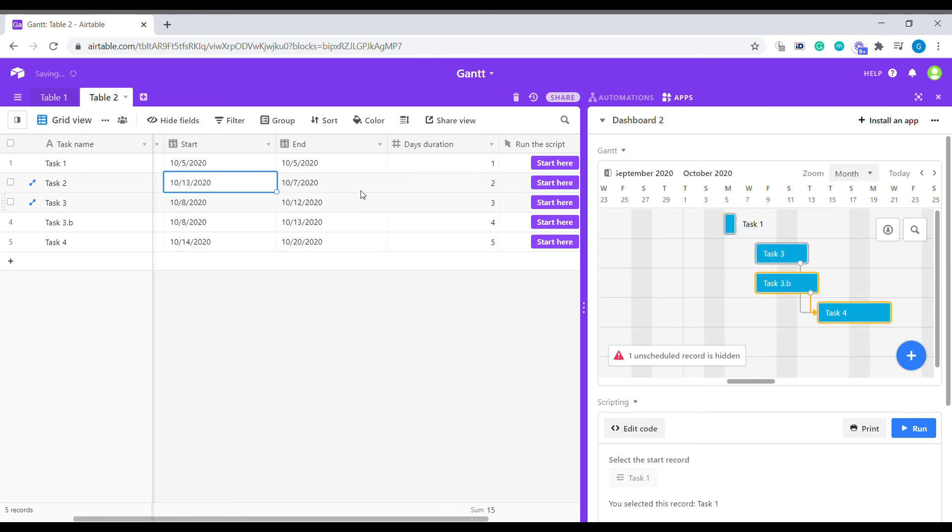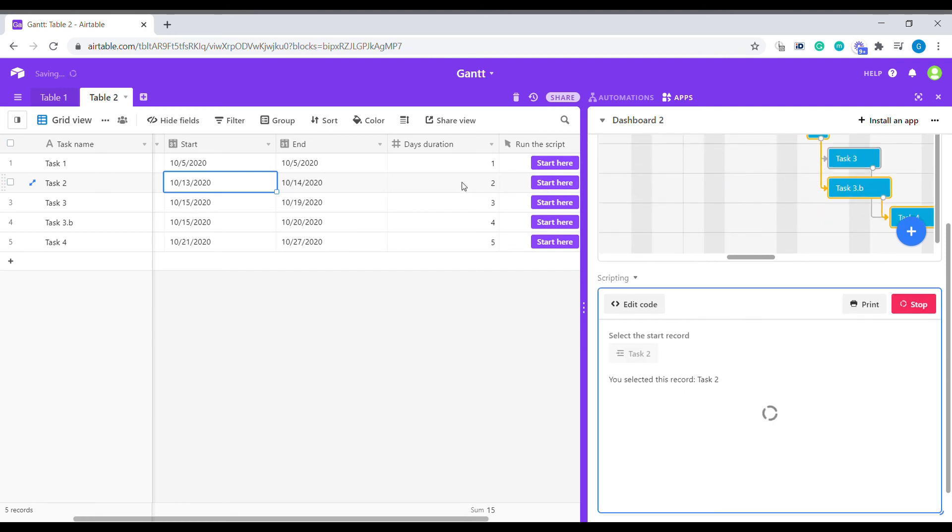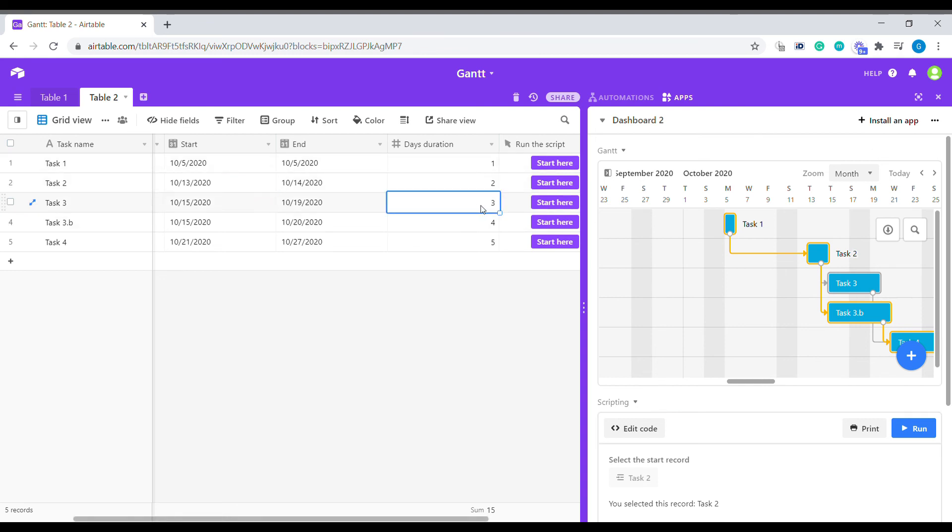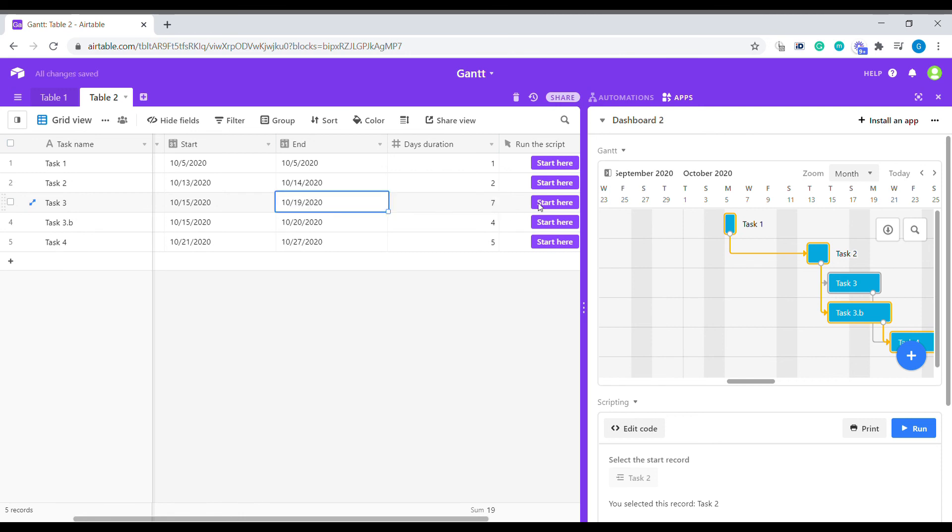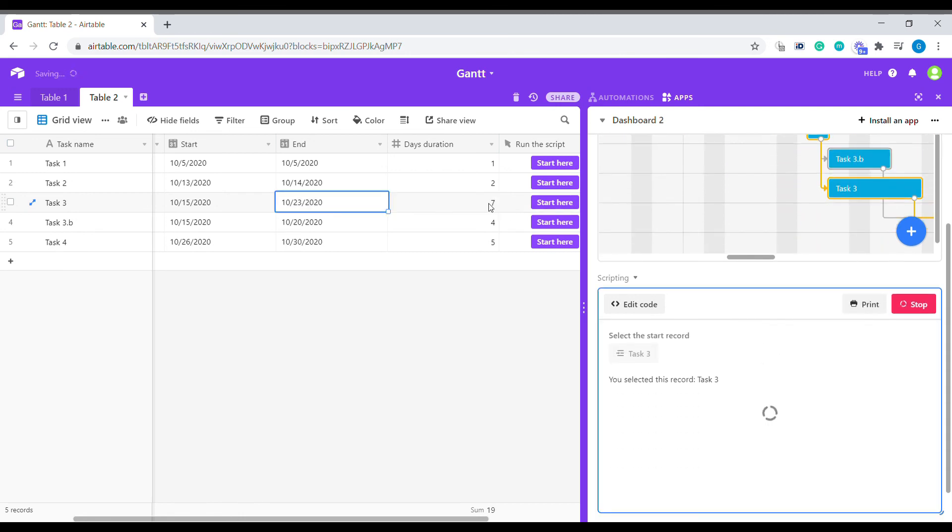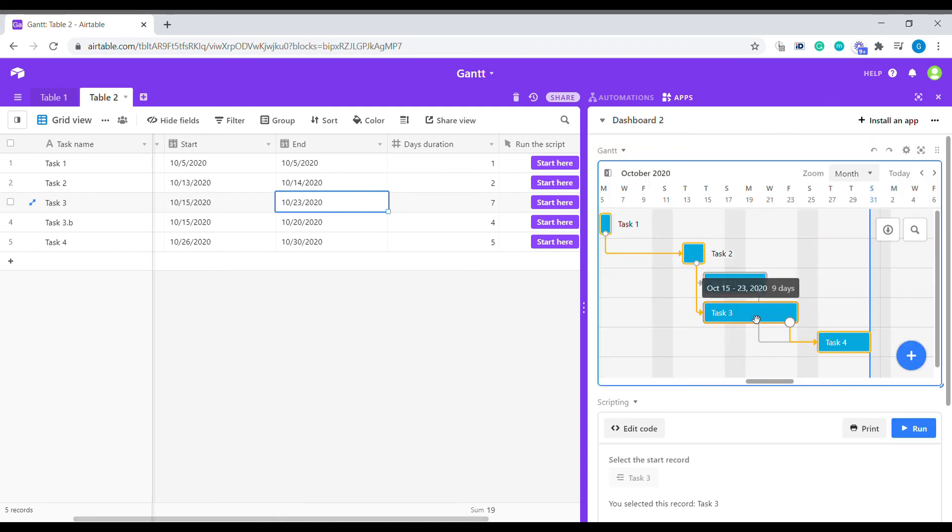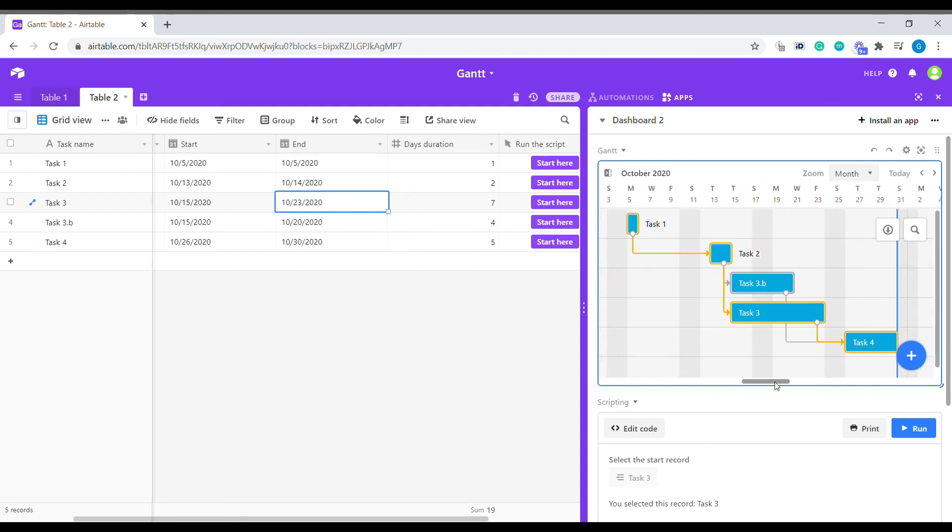which will automatically make it incompatible with the rest. So we need to click start here on the script, and it will push all the other records. The same way if one of the tasks here in the middle changes duration. So for example, this gets extended to seven days. So we're going to update from here. And then duration of this task as well as all the successor tasks will be extended as well.